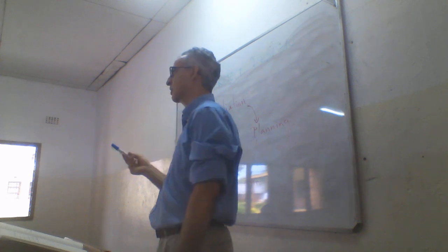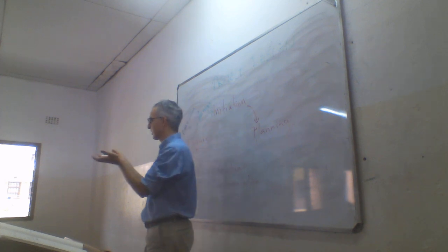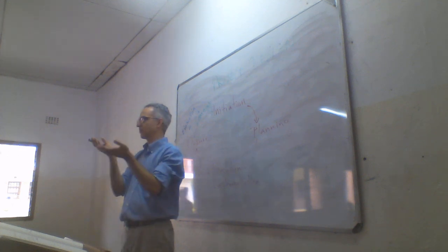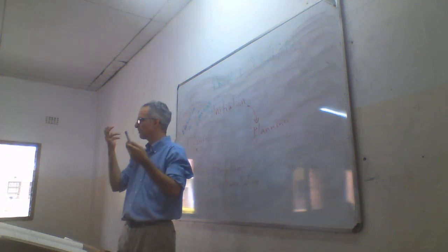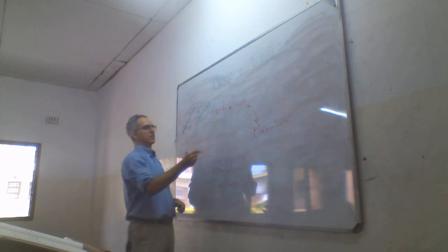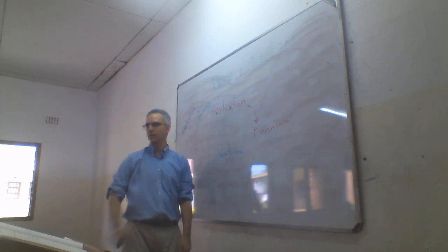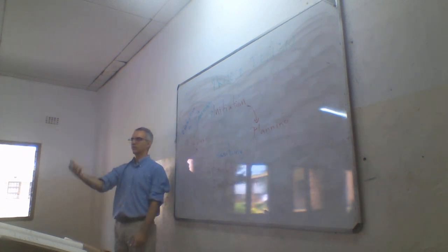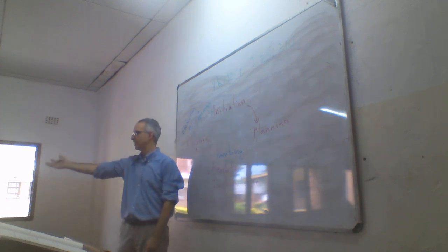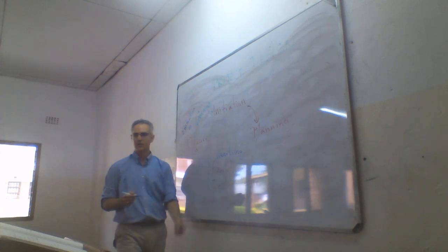Monitoring and evaluation, does anybody know the difference? They're always mentioned together. What are these two? They're both measuring something. The difference is, monitoring is what you do during the project. You monitor, you keep track. Are we on target? How are we progressing? Are we going to make the deadline? Are we going to be delayed? Are we on budget? And so forth. That's the monitoring piece of the project manager.